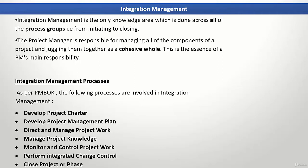Let's talk about an example of how integration management can be done on a project and how different processes can be integrated together. For example, if you're making a bridge as a product and you want to increase the quality of the bridge, this means you will have to consider what changes will be required to the schedule and cost.